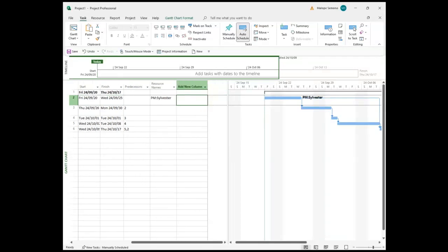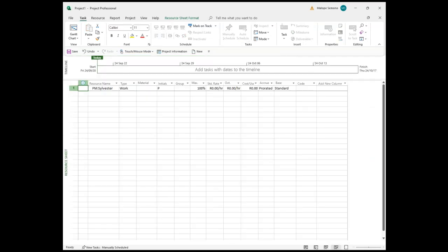But again, maybe I don't want to write each and every role player separately. Instead of writing them one by one, I can come here, anywhere here, and right click. If I right click, you will see I have some options, and one of them is resource sheet. So I can compile a sheet so that when I allocate in future, I can just select. When I click on the resource list, can you see now?